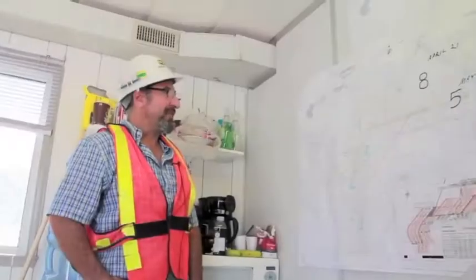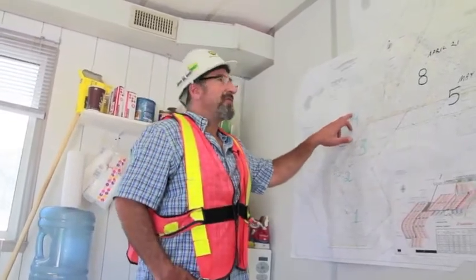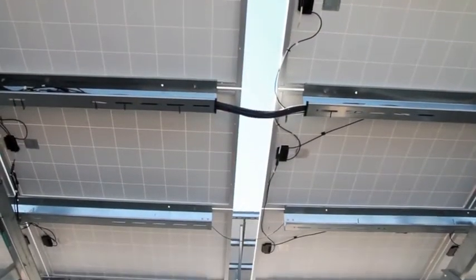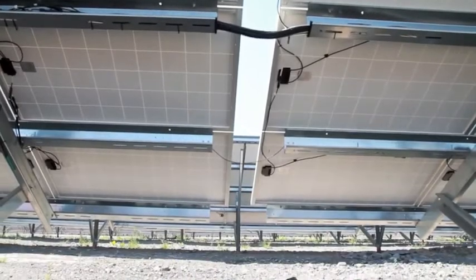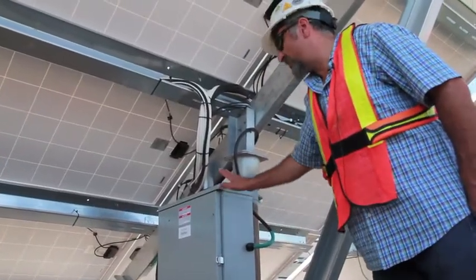We have 5,400 posts for supporting the tables. Of those 5,400, 4,000 are rock socket anchors, and 1,400 are helical piles.